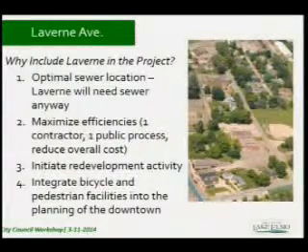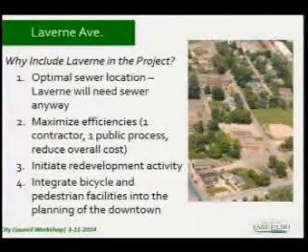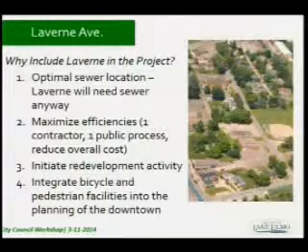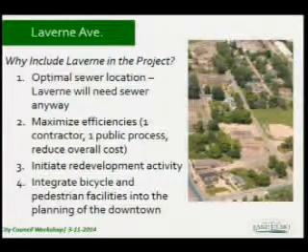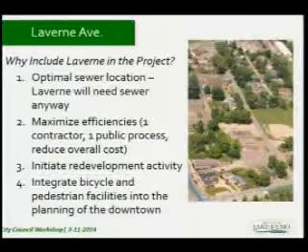The number two reason why Laverne, in our estimation, should be within the project is you're really maximizing your efficiencies. You're reducing costs by working with one contractor. You're going out for bid all in one consuming project, so you're reducing costs that way. But beyond that, you're also doing it all via one public process.